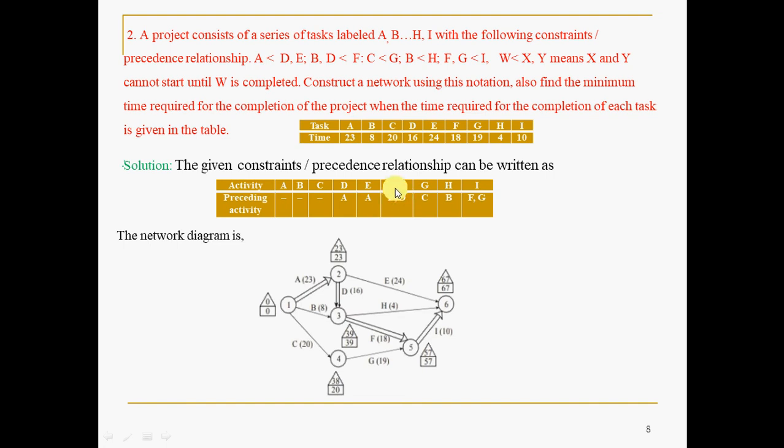After this, B, D, F we can take. See, that's what we have done. That is the smartness, I mean, to make the network as compact as possible. So after A, D, after A, E, this will run. After B, D, what we have done is B and D are terminated with a common node. When there are two predecessor activities, you try to terminate those two with a common node, so that after B and D you can take F as it is given. After B, D, F we can take.